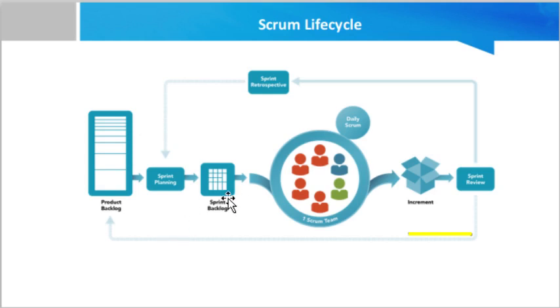Sprint backlog basically includes only what needs to be completed during the current sprint, while the product backlog lists everything that needs to be accomplished before the end of the project. The sprint backlog covers the most current activities, so it typically contains more details and more complete user stories than the rest of the product backlog. It should include your release plan that explains how you intend to achieve the features and meet your sprint requirement. Sprint is a 3 to 4 week time period.